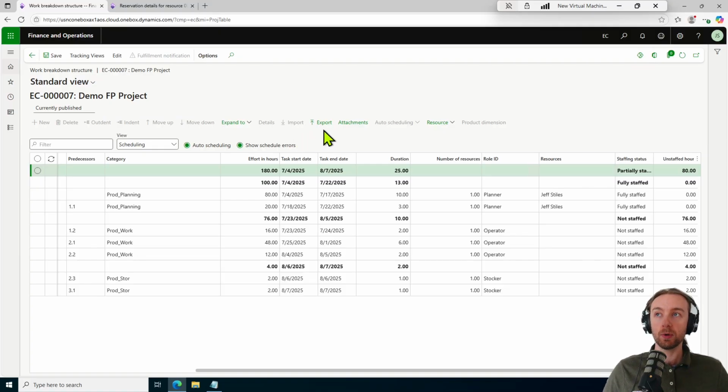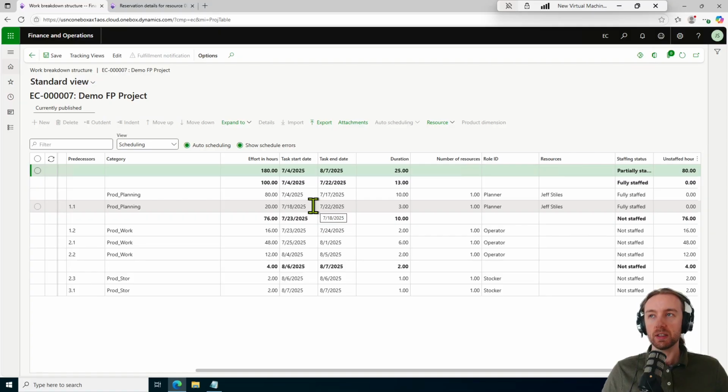percentage of completion performed. Because percentage of completion here is based on hours of effort consumed, we can then take that percentage of hours consumed and create an invoice proposal that automatically has calculated the recommended invoice amount based on the amount of work that has been done. Pretty cool.